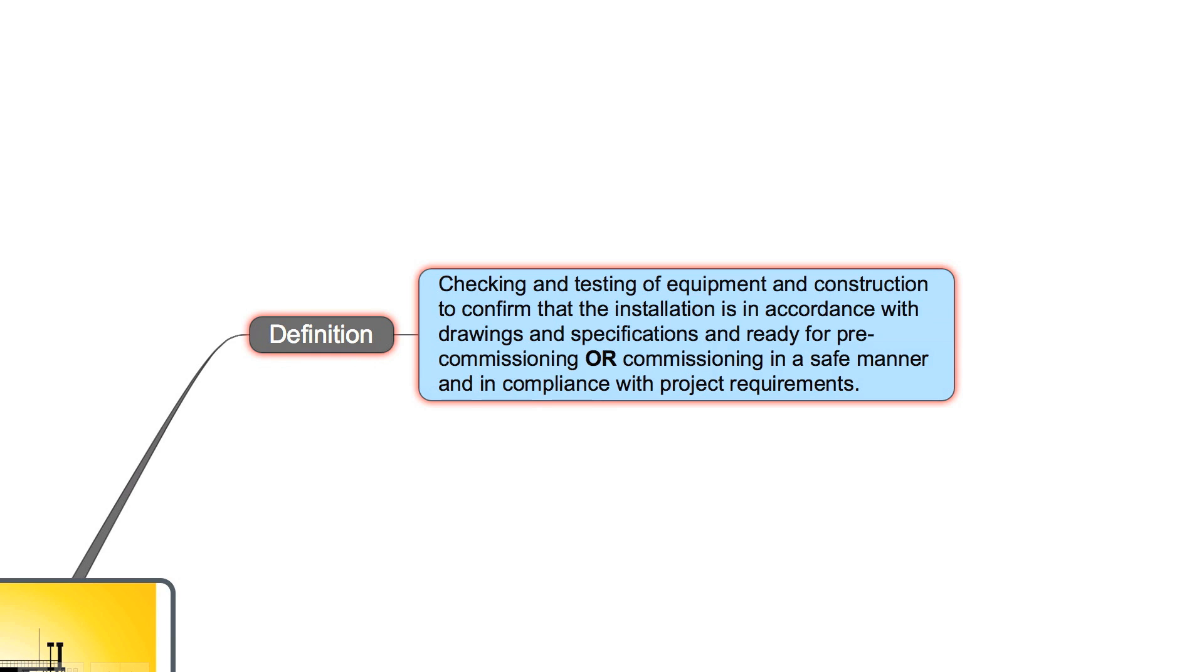I want to give you at first the definition for mechanical completion. Checking and testing of equipment and construction to confirm that the installation is in accordance with drawings and specifications and ready for pre-commissioning or commissioning in a safe manner and in compliance with project requirements. I put the OR in capitals and I marked it bold because mechanical completion can mean ready for pre-commissioning or it can mean ready for commissioning. I will explain this in a little bit more detail later.